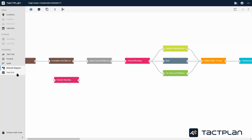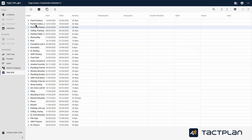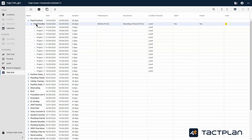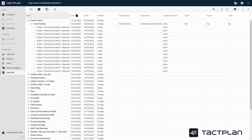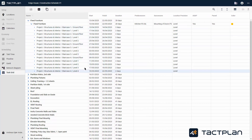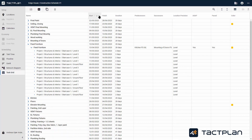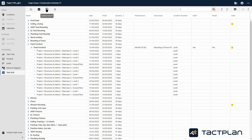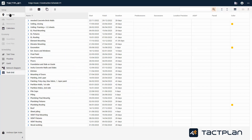To your left you find Task Grid. If you click on this, you can see all tasks and the information around them, including their locations and location level. You can see the start and end date and sort by them. You can also see duration, whether it is set to 'as soon as possible,' color, and dependencies. You can add and duplicate tasks. Filtering and sorting can be selected at the top of each column.